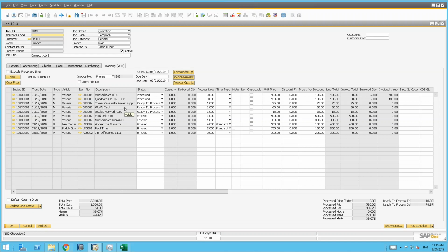And I'm going to bill my customer $500,000 for this job eventually, and that could be excluding change orders, but I'm going to bill that out based on certain progresses on the job or milestones or what have you. So in a moment, we're going to see the contracts module and how you can actually lay out that schema.